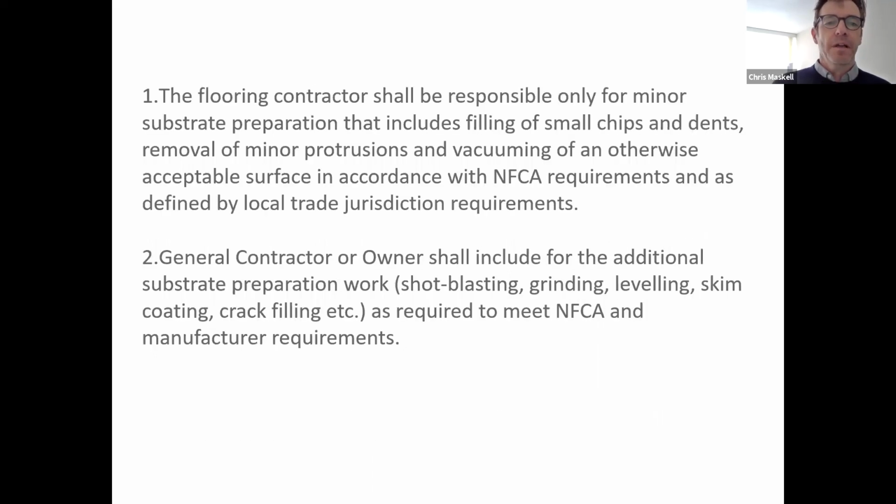Valuable stuff. For the flooring contractor, what are we responsible for? We deal with something that has been for years called min prep or minimal preparation. We arrive on site to a surface that's supposed to be provided ready for flooring. We tidy it up a little bit by filling small chips, dents, removal of minor protrusions, vacuuming of an otherwise acceptable surface. That is key. All the rest is the general contractor's job.